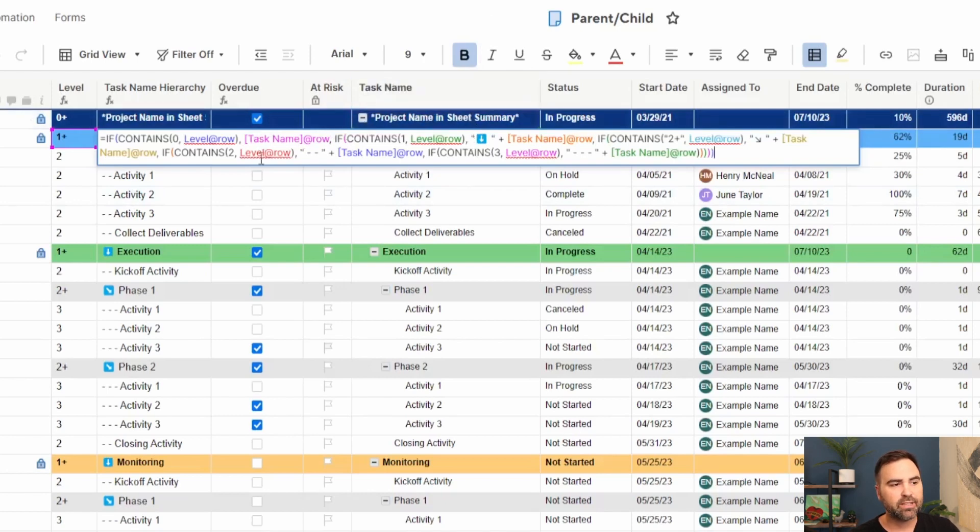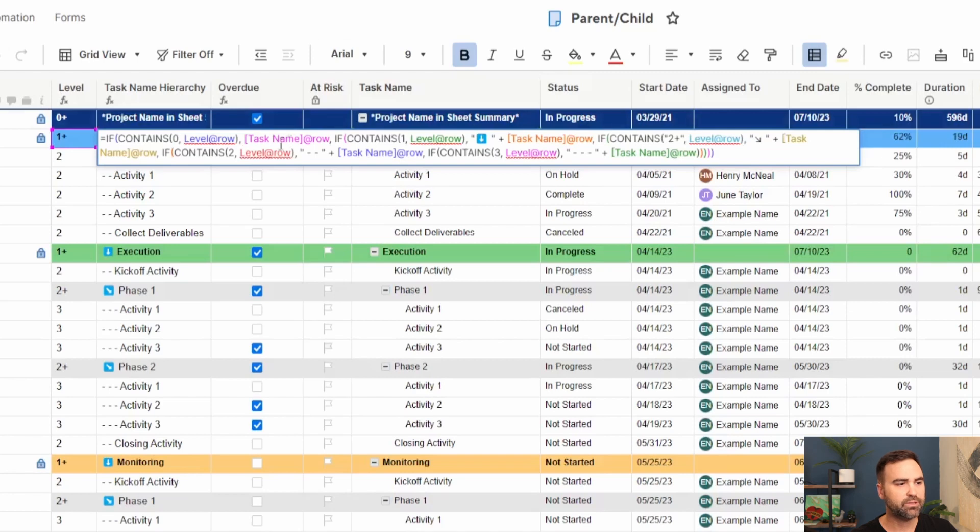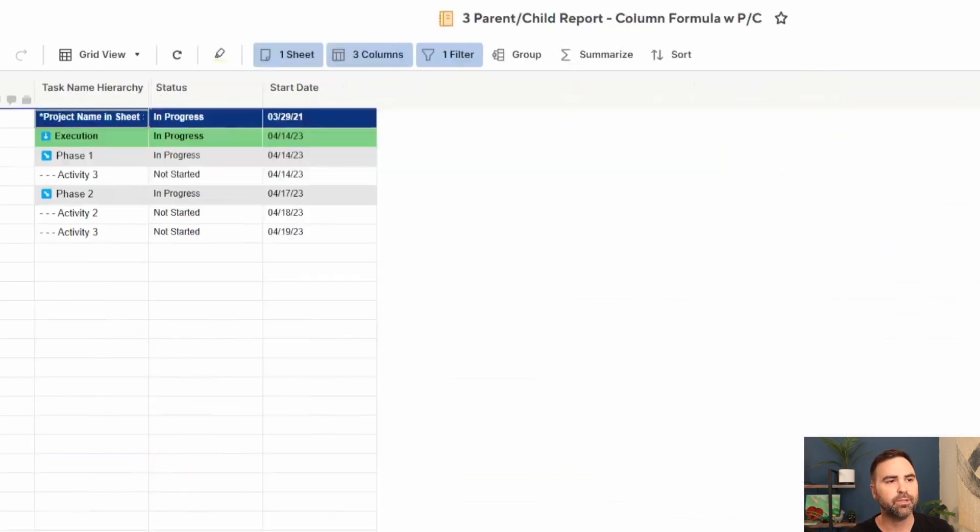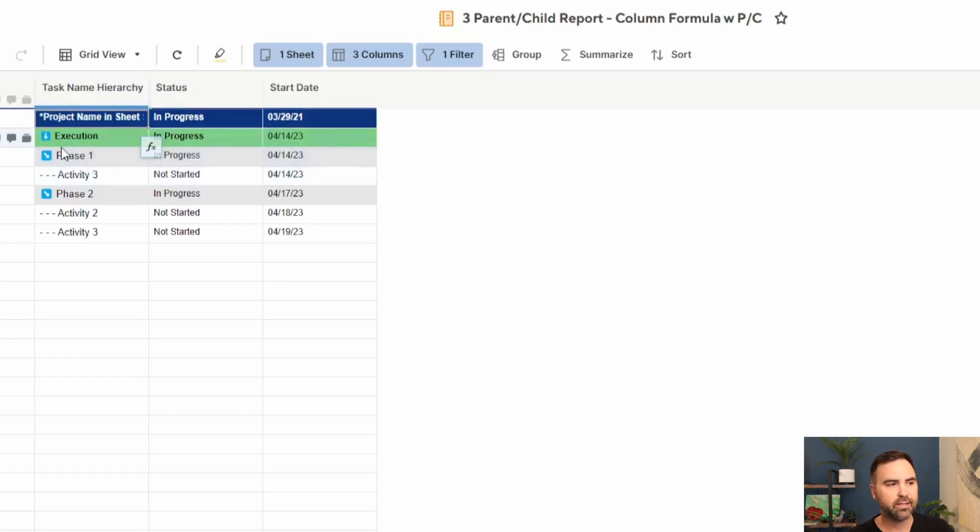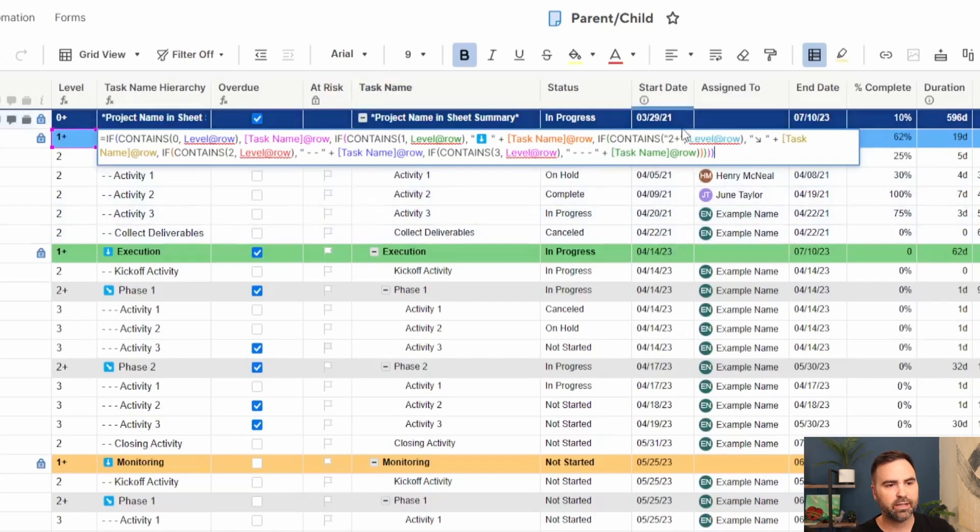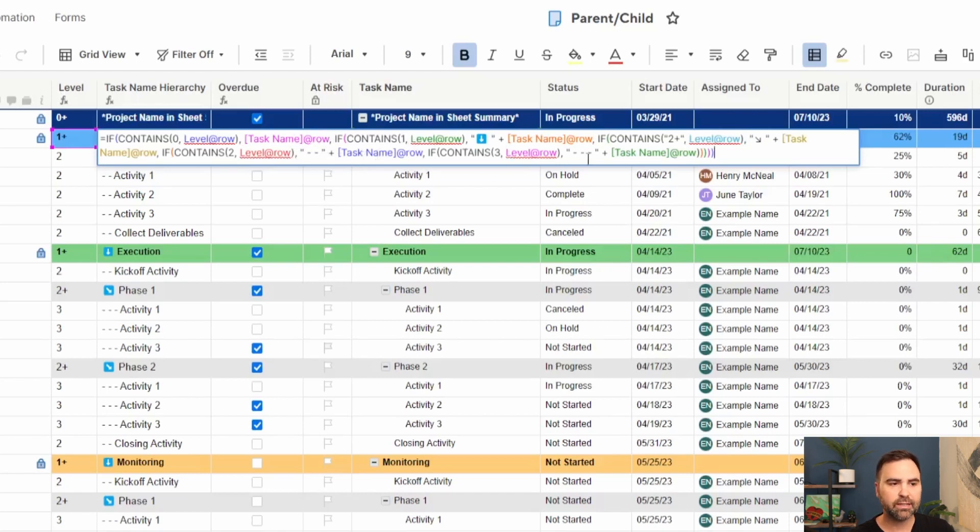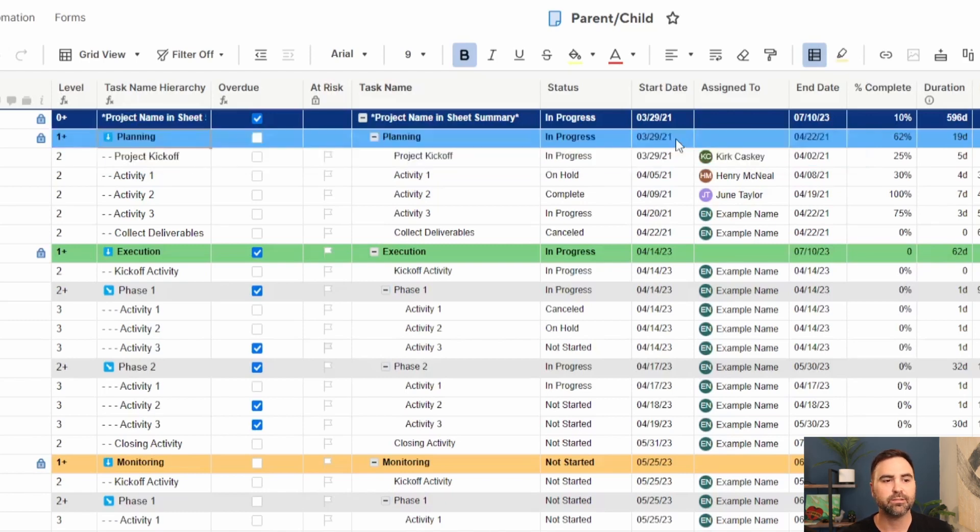This one says, if the level contains zero, then just show me the task name, whatever's in this task name column, that's what I want to see. But if it's not zero and it is a one, if it contains one, then show this down arrow prior to showing the task name, which is what we see here. If it's not level one, let's check to see if it's level two plus. If it is level two plus, then that means it's not only a level two hierarchy, but it also has children underneath it. So we need to show this icon here in addition to the task name. If it's not level two plus, let's check to see if it's level two. If it is level two, we're going to put in these two dashes and then show the task name. And then let's check to see if it's level three. If it is level three, we're just going to put in the three dashes and the task name.